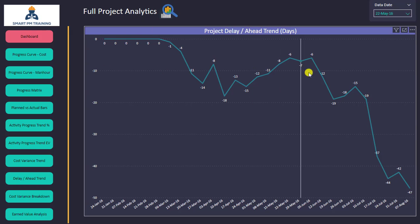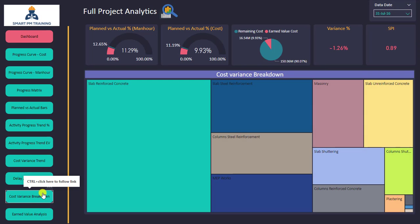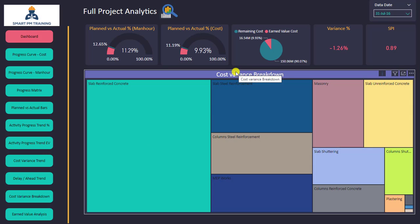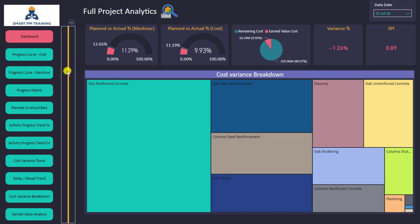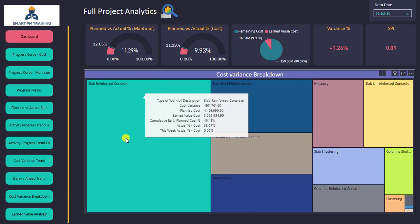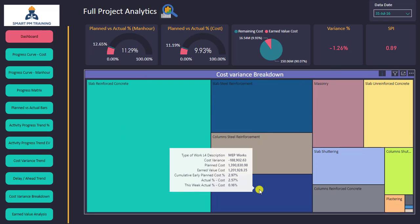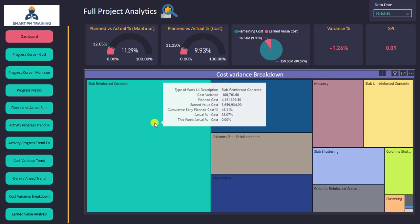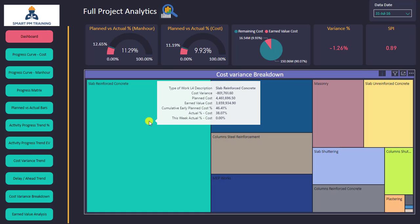I can go to the cost variance breakdown — I know the total cost variance for the whole project and I want to know where the highest cost variance is located. The chart is automatically updated. The highest cost variance is in one area, followed by another, then the next activity and so on. I can hover on any activity to see planned cost, earned value cost, planned percentage, actual percentage, and the actual percentage achieved over the past week.